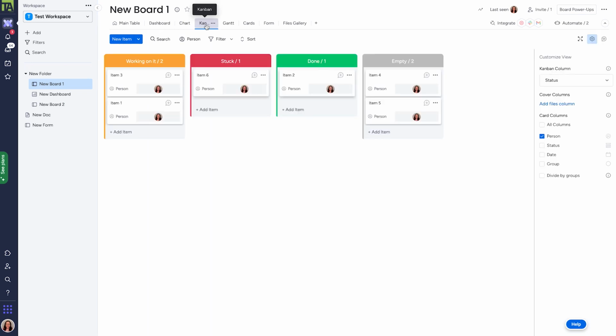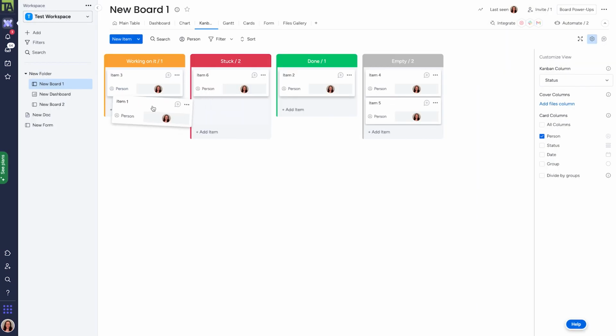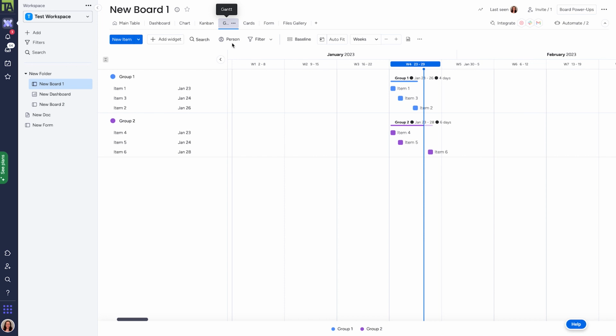The Kanban board option divides work into various stages, and the items that must be completed are little cards that move between those stages. This is common practice for some project managers and can help visualize processes within a project and determine where there are hiccups or holdups that need to be addressed. Another staple in project management, the Gantt view, shows items laid out across a timeline with each item's duration displayed as a colored bar. This is useful for projects that have deadlines and dependencies on other items within the project.